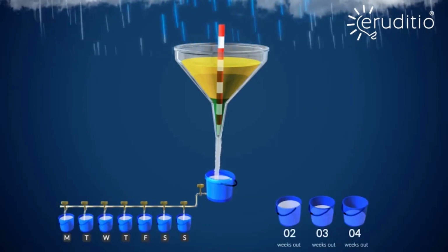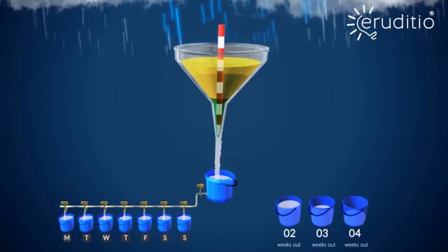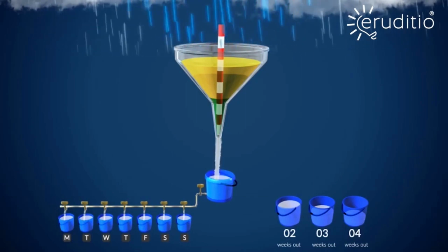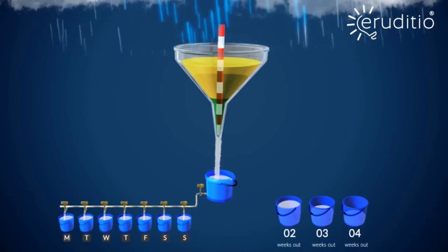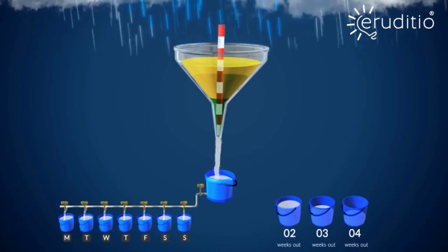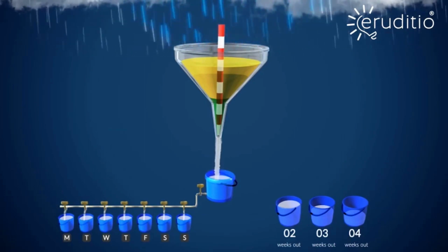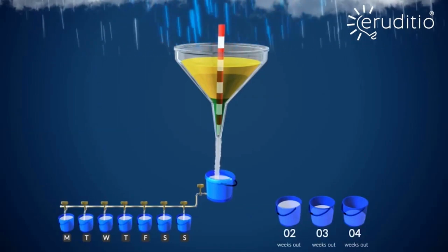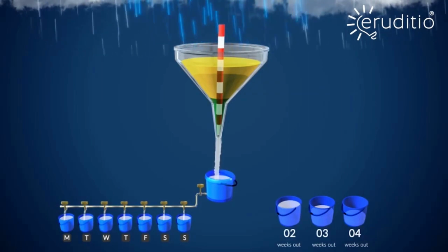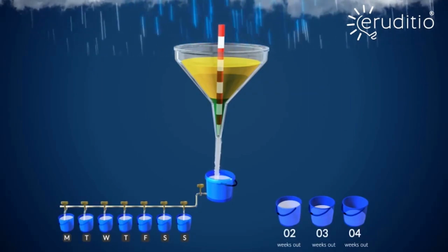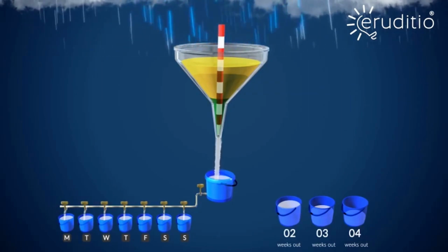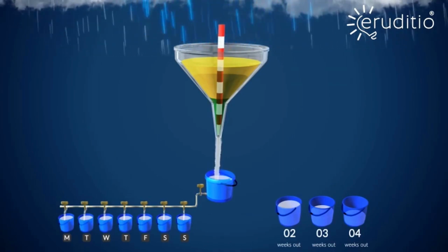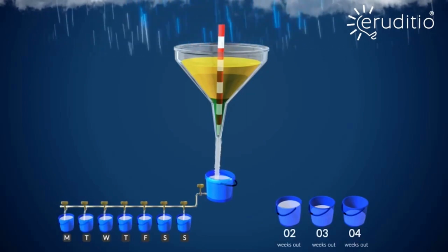Backlog is calculated by dividing the volume of work in hours by the average available labor hours during a typical week, resulting in weeks of backlog. Or said differently, how many weeks would it take to complete everything if that were the sole focus of the workforce? The available labor should not be based on straight time, but instead deduct items such as breaks, lunches, typical meeting time, average absenteeism, average vacation, etc., to get a more accurate picture of true labor availability.